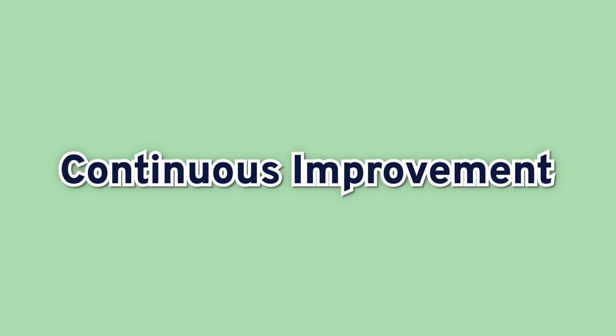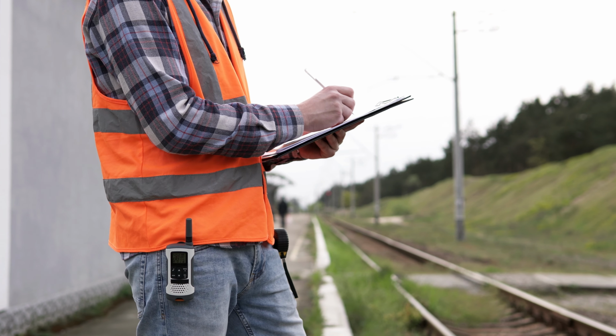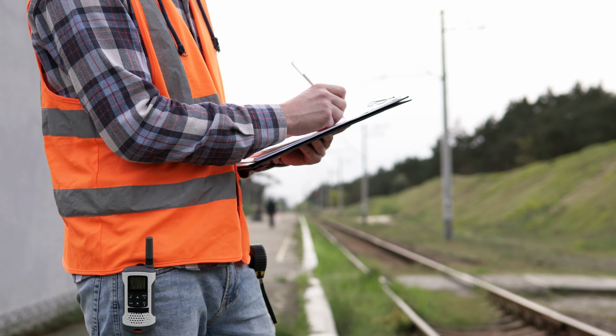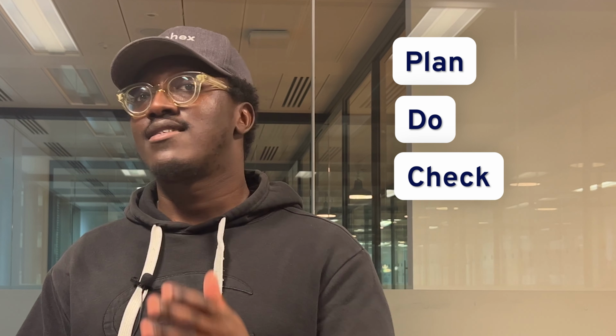Number six, continuous improvement. Lean construction management is about continuous improvements, not shortcuts or overnight success. One example is to encourage teams to keep a log of potential issues that could disrupt productivity on your project. These blockers are then analyzed by something lean practitioners call the PDCA cycle: plan, do, check, adjust. Then, corrective actions can be taken to get things back on track. By reporting these blockers, investigating them through root cause analysis, and then taking action, you improve project productivity.